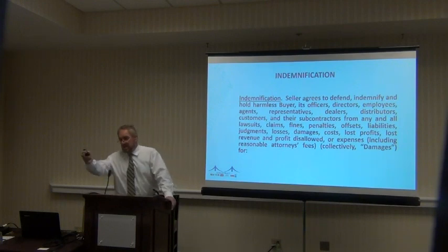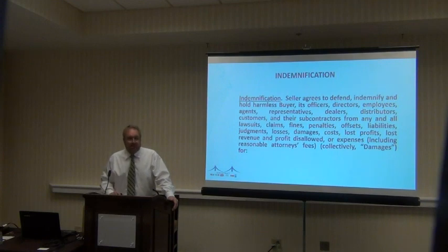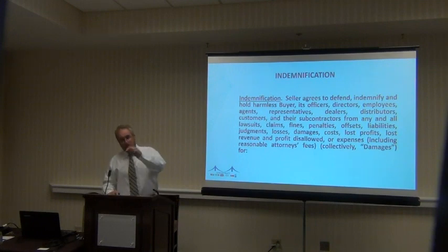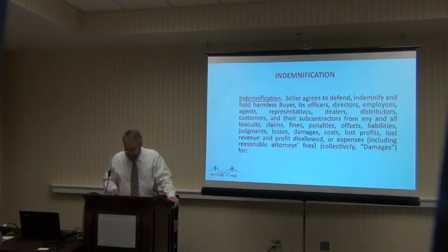So if I'm indemnifying Jim for something I did, that's fine. But the Kansas statute says it's not legally allowable for me to indemnify something that Jim did. Why would I want to protect him from what he does wrong? If I do it wrong, that's what the statute says. Great point.